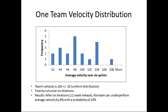The product owner might say that's a disaster, in which case we need to make a change. Or they may say that's totally fine and we'll still release — in which case we now know the bottom 8% of the backlog is optional, meaning we could release earlier even if we're hitting a velocity of 100. We've discovered through this conversation that the bottom 8% of the backlog is not actually necessary. This is not a conversation that could take place using the standard approach, which simply says six iterations at 100 points means 600 points done.